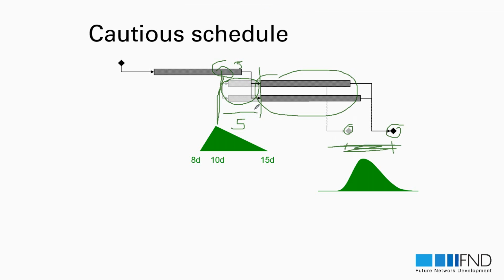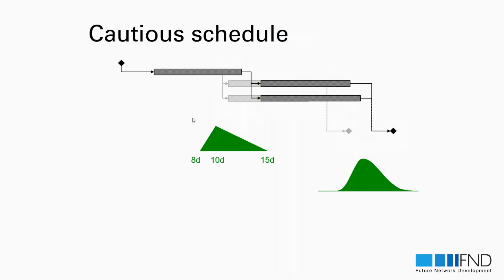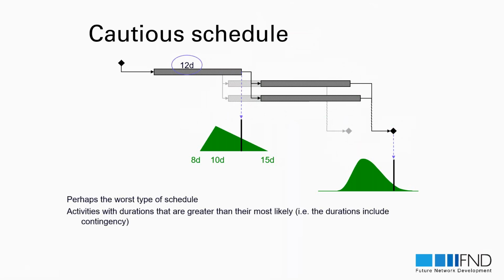But I am safe if my activity is delayed. This is the approach we call pessimistic schedule. Of course, the advantage is that you can be safe, but the disadvantage is that we can delay the start of other activities, and it is maybe one of the worst types of scheduling method, causing projects to have a longer duration than necessary.